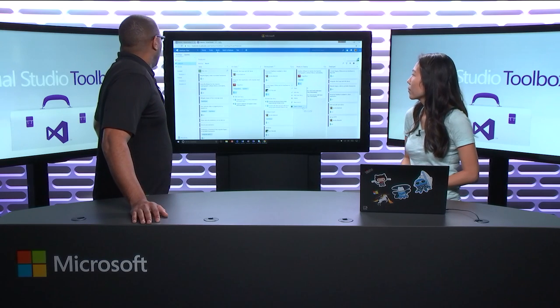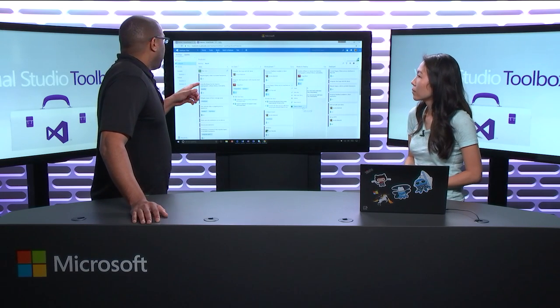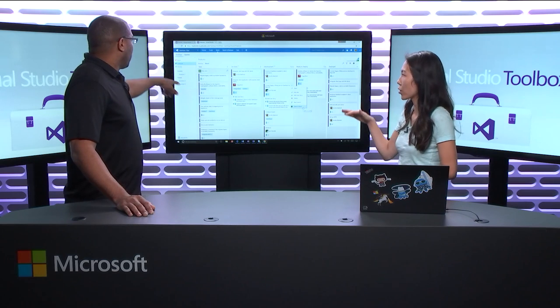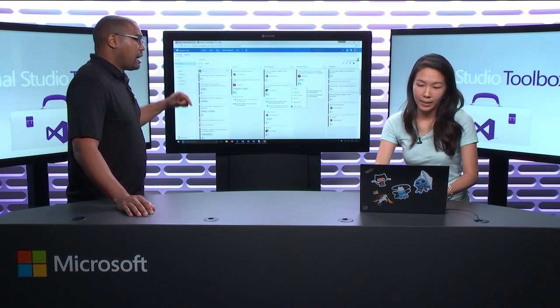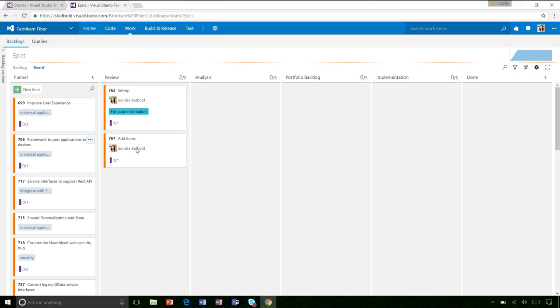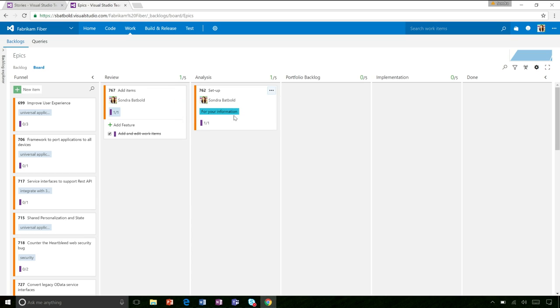At the story level that's your developers, and PMs, scrum masters, or product owners might use the features level. There's also an epic level — here you can see an epic has one feature and that feature has been completed. Epics generally last a lot longer; they're more longer-lived artifacts and won't have the same constant flow you'd expect at the user story level. The more strategic initiatives can be tracked at the epic level.